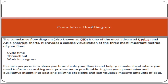The Cumulative Flow Diagram, also known as CFD, is one of the most advanced Kanban and agile analytical charts. It provides a concise visualization of the three most important metrics of your flow: cycle time, throughput, and work in progress. The main purpose is to show you how stable your flow is and help you understand where you need to focus on making your process more predictable.